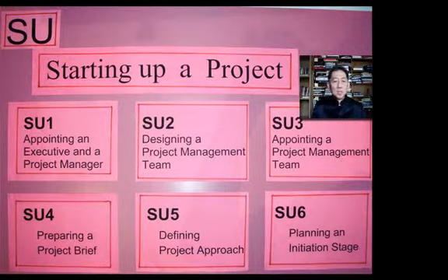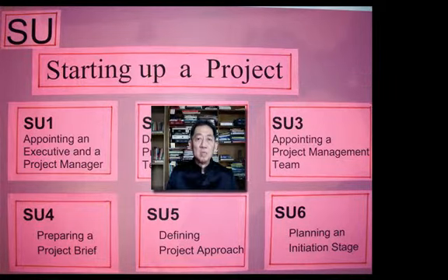So now, preparing the project brief, of course, is a summary of what the project is all about. The next one we call defining the project approach. The project approach needs to be decided early on, because that affects how you plan the project. Approach means things like, should you do it in-house, should you outsource it, should you use subcontractors, and a whole bunch of combinations of all these variable factors.